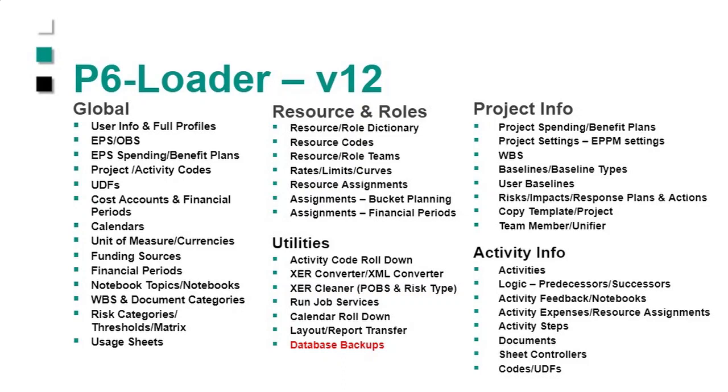Like we let you roll down activity codes and calendars. We let you move layouts and reports from one database to another. We let you back up the entire database if you want. You can read and write XERs and XML files, and you can run job services. So if you want to do a load and then reschedule the project, you can do so. And one of our large clients does that. They do a very large data load on the weekends, and then every project gets rescheduled after it's finished loading. So those are all things that you can do within P6-Loader.